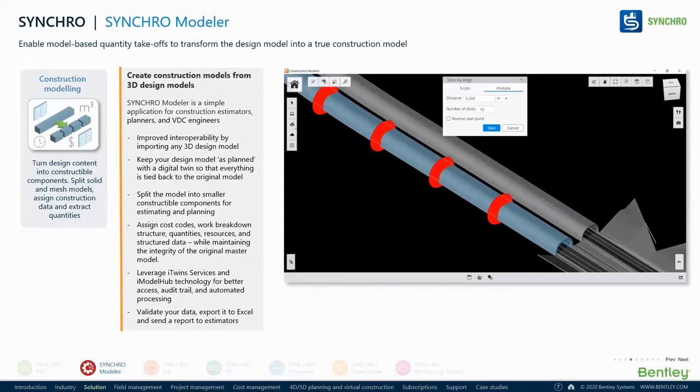Also, your crew may have the ability to construct a layer, maybe a subgrade layer, 20 kilometers a day or 10 kilometers a day. So you have to divide that and create the schedule. But all the design software like Bentley OpenRoads or Civil 3D do the modeling by the mesh analysis method. So cutting that cross section in your planning software is difficult.